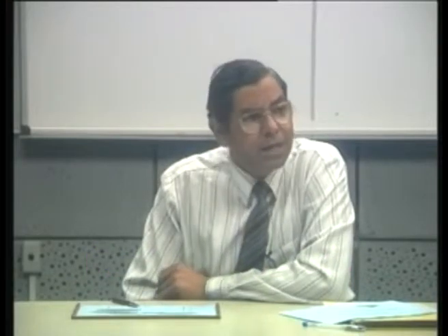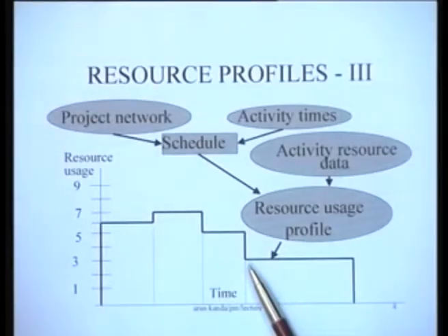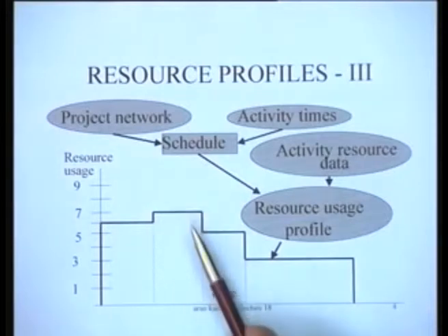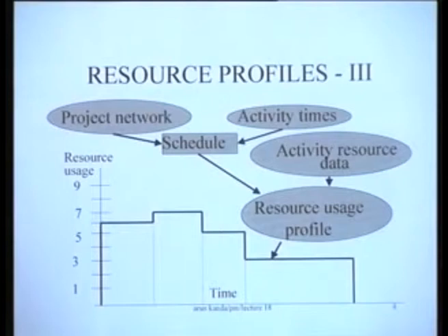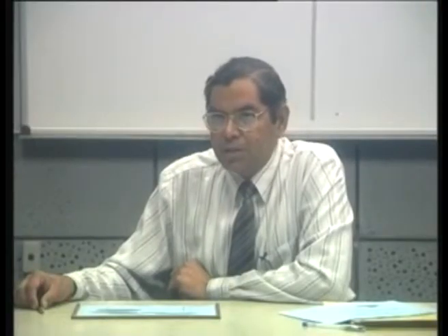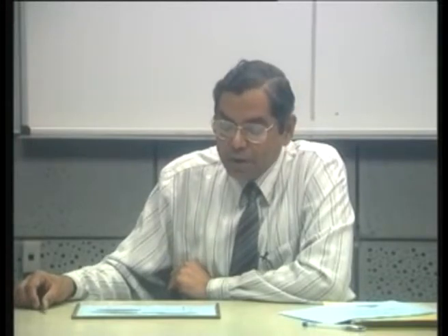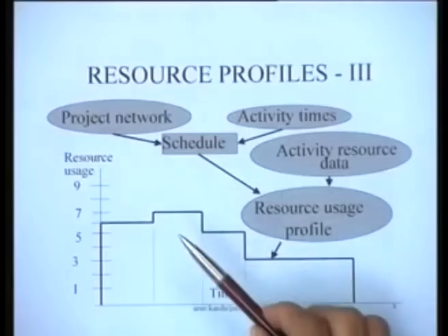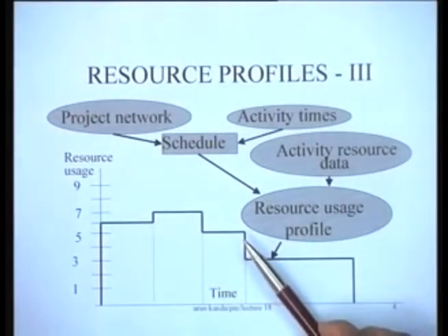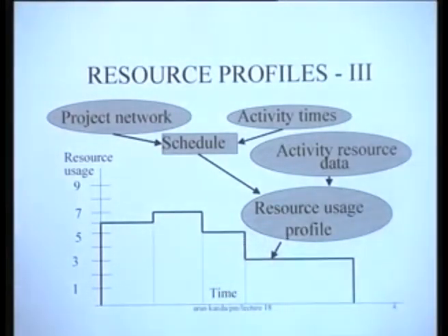Similarly, if this is a capital equipment like cranes, you know when to hire how many, and so this particular information again is really very vital when you are trying to talk about the resource profiles. So when we are talking about resource considerations in projects, which is the theme of this lecture today, we are primarily concerned with the construction and the manipulation of these resource usage profiles.